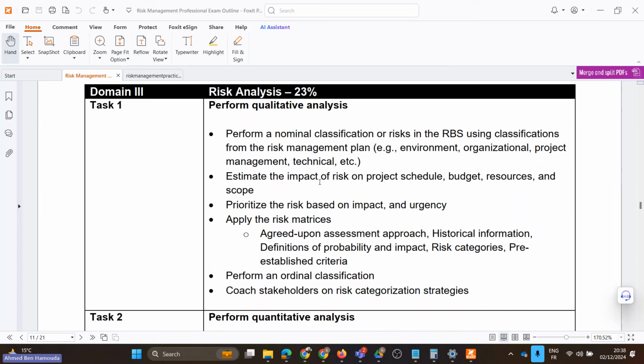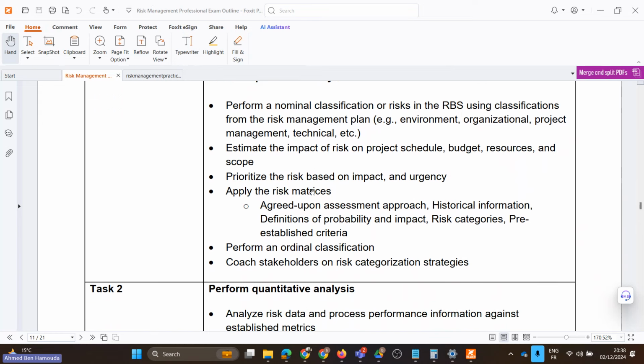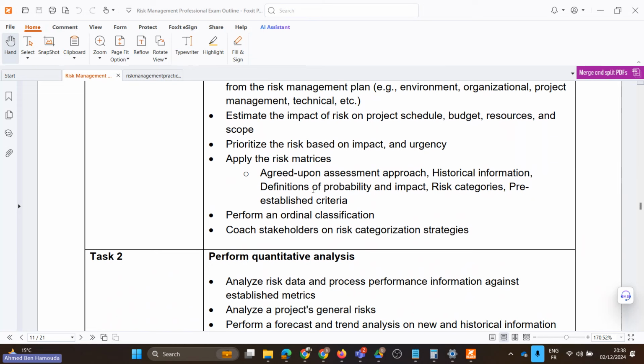Okay, but technology, once it's trained and programmed, will actually help the project manager a lot with identifying risks. Okay, then as part of the qualitative analysis, we also estimate the potential impact of the risk, and always the potential impact is on the project schedule, scope, first of all schedule, budget, resources, and also on the expected value to be delivered. That's quite important. Then, once the probability and the impact are known, the risks can be prioritized, and we will see in the next session how we will do that.